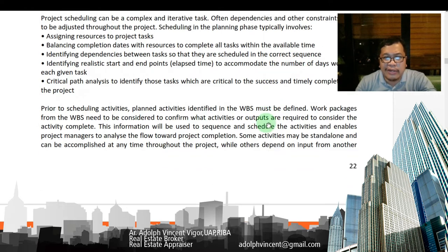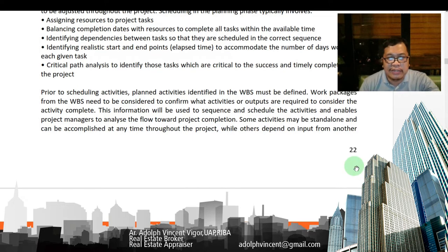So prior to scheduling, the activities identified in the WBS must be defined. Work packages from the WBS need to be considered to confirm what activities or outputs are required to consider the activity complete. This information will be used to sequence and schedule the activities and enable project managers to analyze the flow toward project completion.